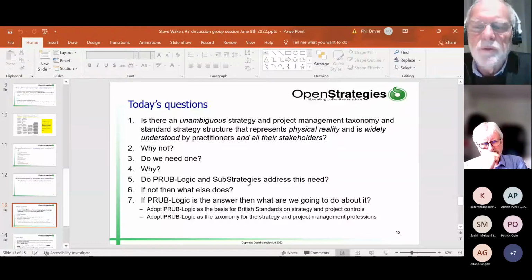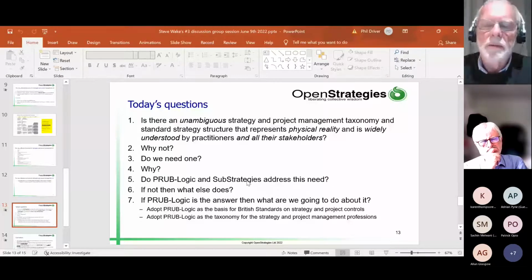Others felt it had to be occupied, and before you went ahead with the strategy, you would have to look at which of those benefits were your objectives. So you could have a bunch of benefits that you choose not to aim for. You can exclude those and say, no, actually, we're only going to focus on benefits number 1, 4, and 7, and those are our objectives.